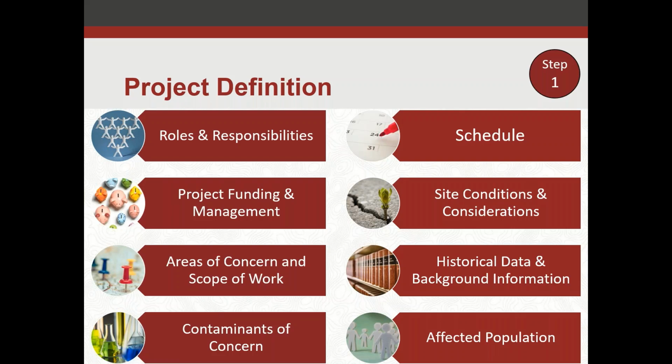It's critical to know if there's certain agencies involved and what their requirements are for hazardous materials. You've got to do the minimum requirements, but some agencies may want to take things a step further, and they have written protocols as far as how you want to follow those procedures. So you need to know those up front, so that you're not in the middle of the project and realize that you didn't assess for something, you didn't account for something to meet their requirements and criteria.